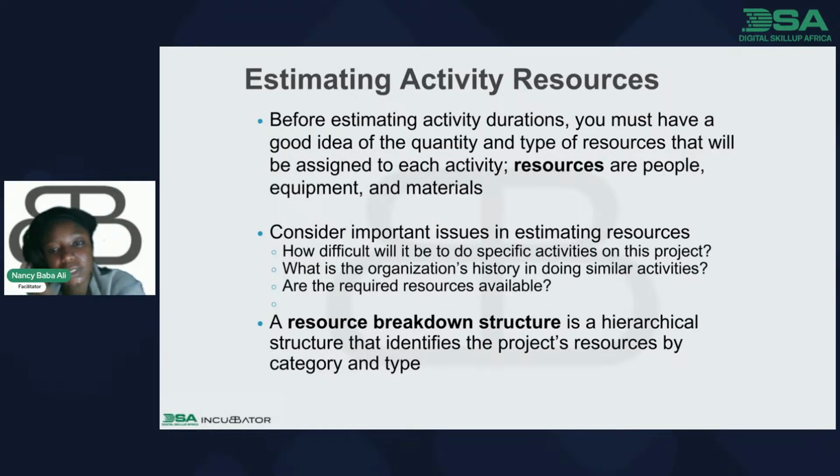So consider important issues in estimating resources. How difficult will it be to do specific activities on this project? What is the organization's history in doing similar activities? Are the required resources available? So when you're estimating in a project, you have to do research about the organization. Is this a project that they have handled before? Are they just revisiting this type of project, or is this their first time handling this kind of project?